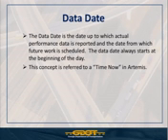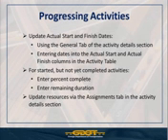But the data date then is the point from which all future work is going to be scheduled. And again, this concept does exist in Artemis, and it's just referred to as time now. When we talk about progressing activities, basically that means we're updating actual start and actual finish dates. There's a couple of different ways you can do this, and we'll take a look at a screenshot in a minute. But there's an activity detail section within that activities view where you can mark an activity as started and change what the start date is, and then put what the finish date is. You can also put columns right into your activity view for actual start and actual finish and enter those dates.